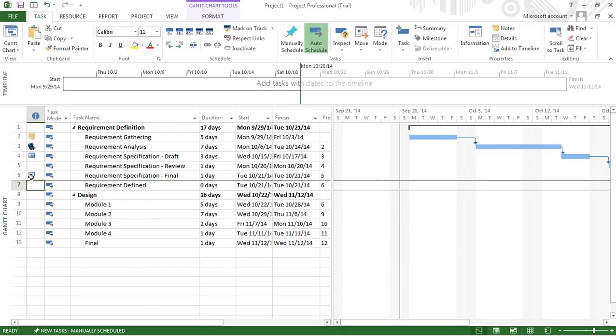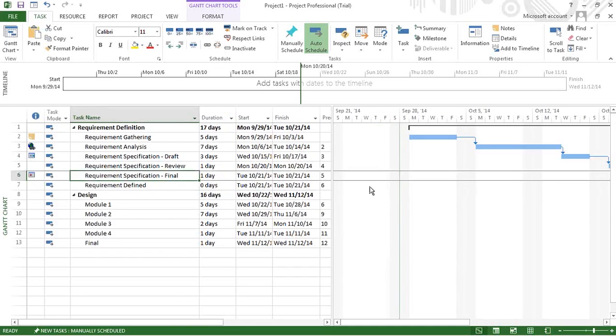Another example could be, let's say you have some dependency on another project. So rather, the other project has a dependency on you and they need to start, they have a constraint to finish within their timelines, and for that they may give you a constraint, since it is an external project where you will not have the predecessor of that, right? So in that case you can put a manual constraint saying this task has to be finished by so and so.